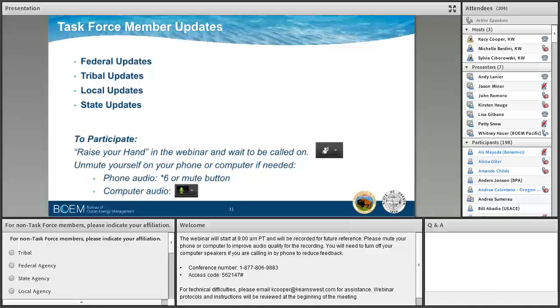While not offshore wind, the PacWave South project, which is a wave energy test facility proposed by Oregon State University, is under review. On April 23rd of this year, the Federal Energy Regulatory Commission, or FERC, issued the environmental assessment for the PacWave South project with a notice of availability, which includes a 45-day comment period for the environmental assessment, or EA. Comment period closes next week. BOEM's proposed action is to issue a research lease for the project on the OCS, or the Outer Continental Shelf, and for easements for the five subsea transmission cables offshore.